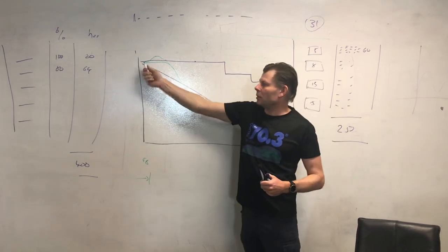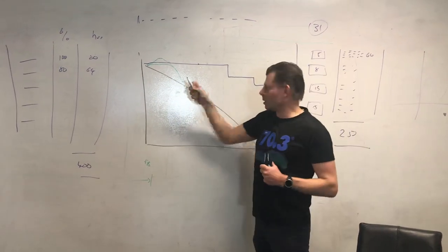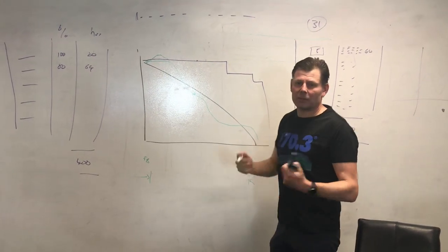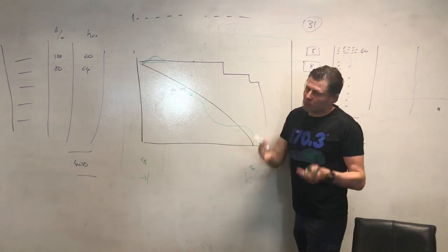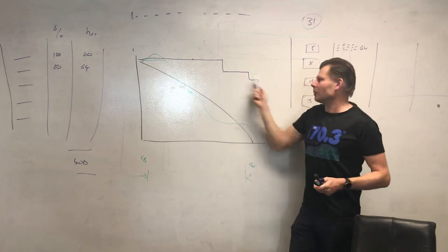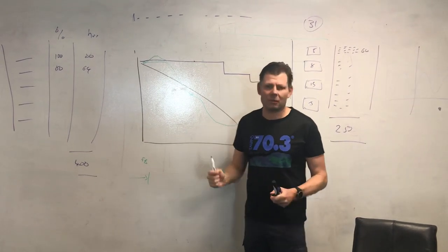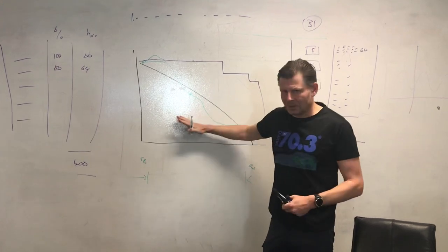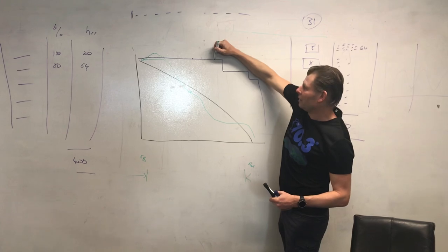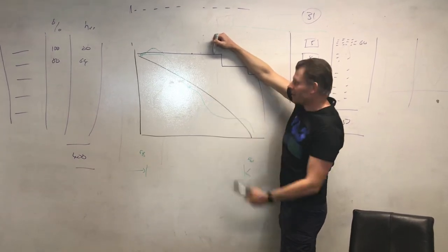Sometimes teams can use story points for that. And if it's a high performing team, that can actually work quite well because it would zigzag down and we can see how many stories we've delivered, how much value we've created. But on occasion, and often, teams aren't like that, and the response curve looks something like this. Now that in itself is a problem that we need to look at and challenge with the teams, but in the meantime it means that the burndown chart is not much use, because on a given day, and this day in particular, what do we know? We've not delivered anything, so it doesn't really tell us anything.